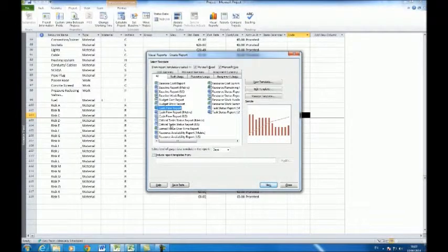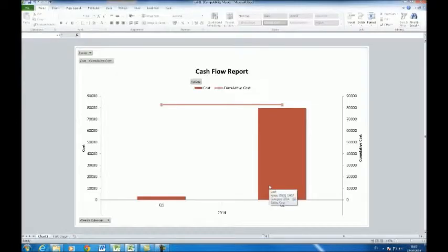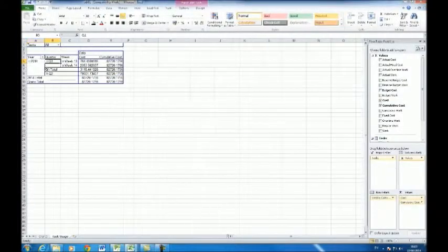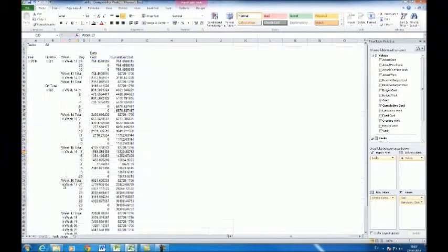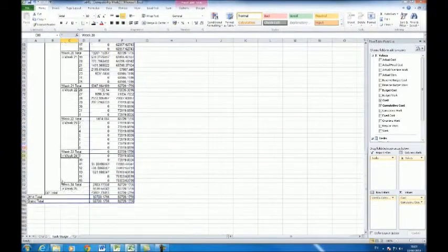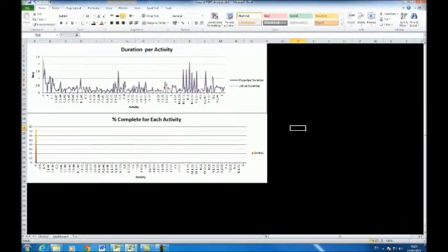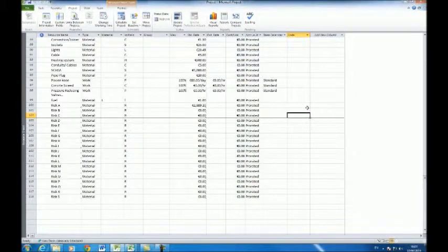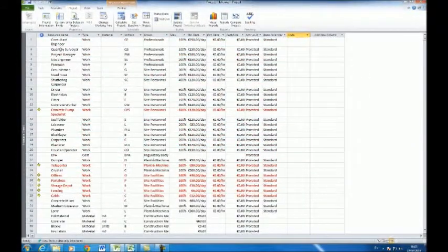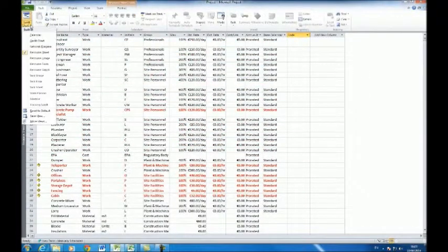In project, cash flow reports among others can be generated by clicking on the Visual Reports tab at the top of the screen, and selecting Cash Flow Reports from the menu, then pressing View. As previously carried out, open the Task Usage tab, then open each individual tab. Return to the Chart 1 sheet to observe the graph. Save as required.